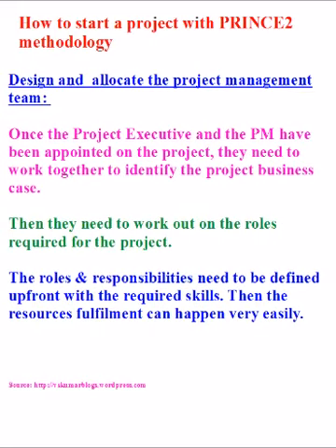Now once the roles and responsibilities are defined, resource fulfillment needs to happen. They need to do the recruitment for the people for the project activities or stages. These roles can be there for a particular activity or for a particular stage of the project only, or some of the roles can be there till the end of the post implementation. Let us say the PM role is very critical, and it is very essential to be there till the sign off happens for the post implementation of the project. Like PIR, after post implementation review, there will be a sign off for the post implementation review.